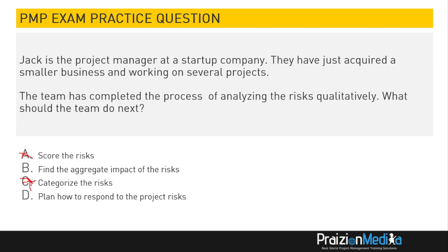Now D, plan how to respond to the risk, is premature. That happens after you carry out quantitative risk analysis. So the best answer by logic is find the aggregate impact of the risks, the aggregate effect of risks on a project. And that's quantitative risk analysis.